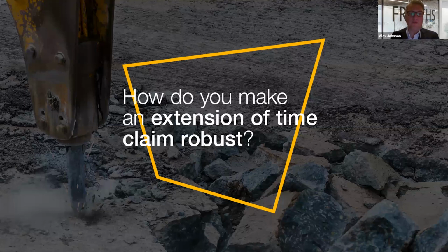And that will involve pointing to documentary records, to evidence that the event occurred, which entitles the contractor to claim the extension of time, and that the event caused delay to the completion date. And now, dealing with the second of those questions, it may be necessary to show the impact on the schedule, which has been caused by the delaying event.